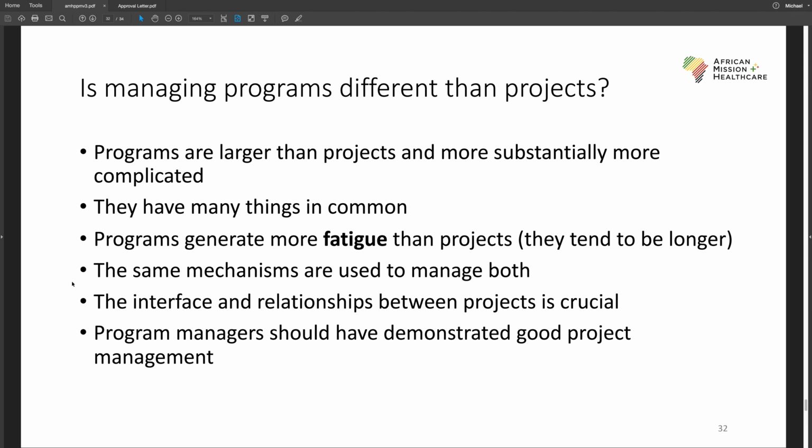You've got to make sure that those projects are working with each other in 2 key ways. The first one is they need to be sharing issues with each other. So when there's something that needs to be resolved, an open question that's sizable and important, there has to be a shared issue log between the project teams that is driven towards conclusions where all stakeholders have a say in the process, because the coordination challenges get pretty extreme.